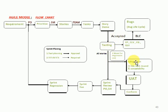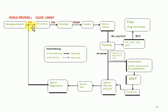The UAT team also performs UAT testing. Once UAT confirms everything is fine, we give the sprint demo to the product owner and stakeholders; if they approve, it goes live. Then sprint retrospection follows. Every sprint also has a sprint planning meeting at the start, daily scrum meetings throughout, and a sprint retrospection at the end. The retrospection involves the scrum master and entire team — the product owner is optional — and they identify what went well, what went wrong, and lessons learned.